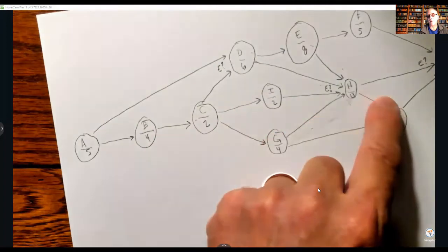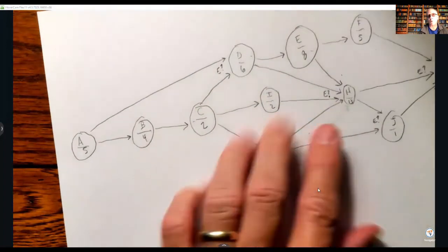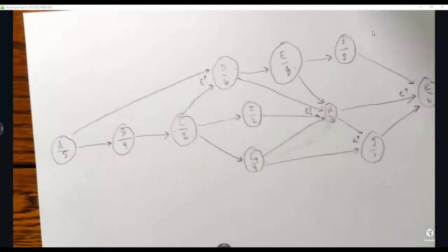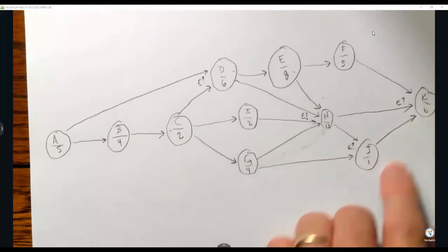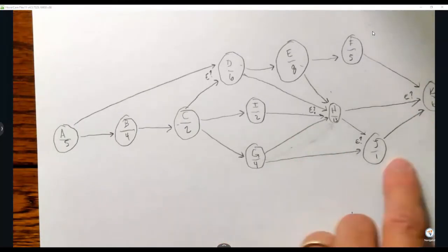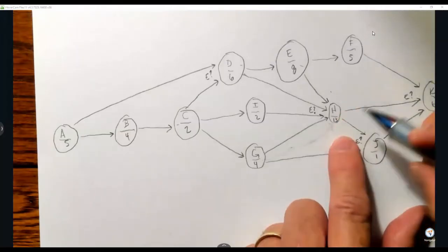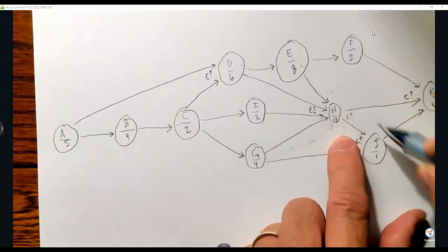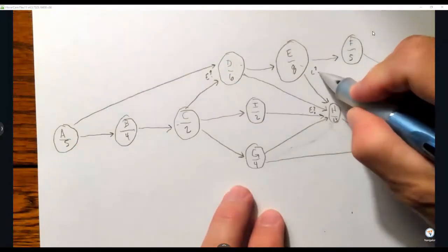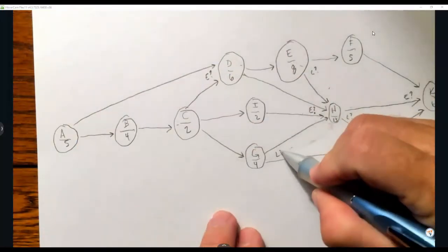See, there's an arrow here. There are arrows coming into there, more than one. I've got to get rid of this picture of myself so it's not in the way. Okay, and some arrows coming in there. So those are my E's. And then I do my L's, the ones that are backing into it. Oh, there are 2 backing into this one, so I have an L decision here. I have 2 backing into this one, so an L decision here. And 2 backing into this one, an L decision here.